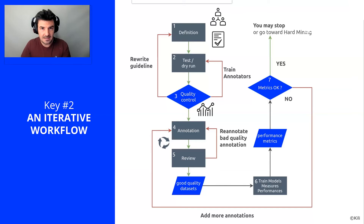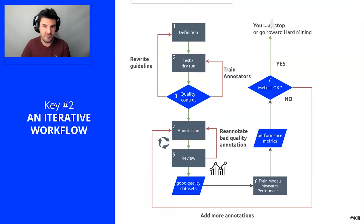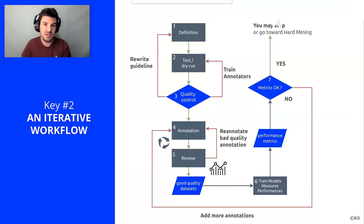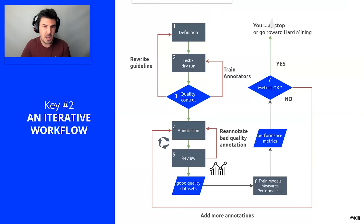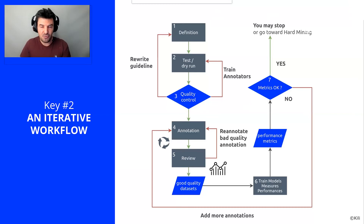Once we have robust guidelines, we enter the annotation phase. Here we annotate batches of images to pace the project, and the data project manager is able to review the annotated images in real time. We can detect, for example, those that have a bad consensus and ask for re-annotation. This allows us to quickly obtain a first quality dataset that will be transferred to the R&D team.